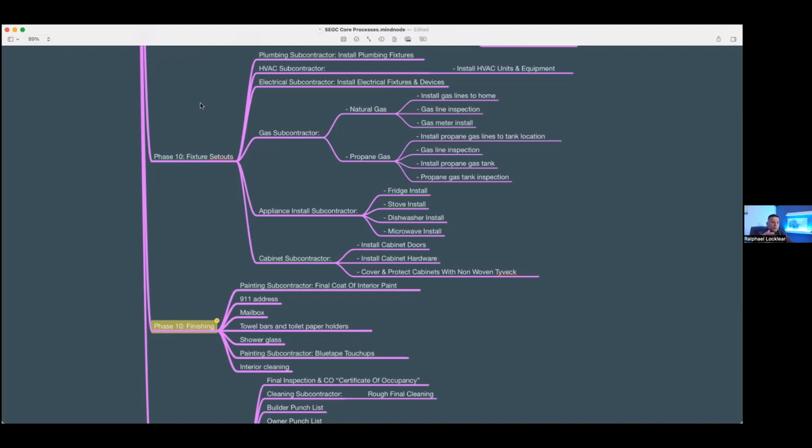And if you've got hardwood floors and then underneath your crawl space gets flooded or gets molded and mildewed, now you've got bigger issues with your subflooring and with your flooring. But yes, we do still do those. And when we do crawl spaces, the only way we do them now is if the owners agree to incur the cost of doing an encapsulated crawl space.